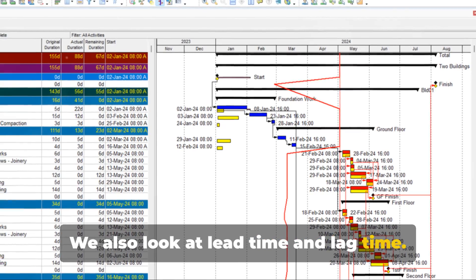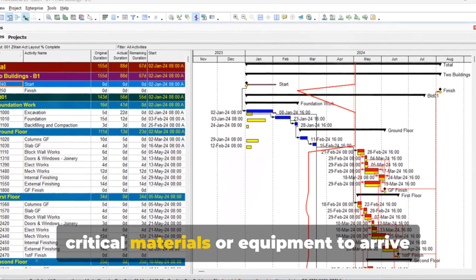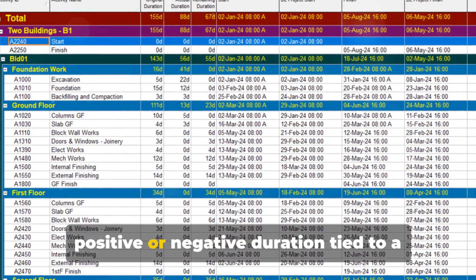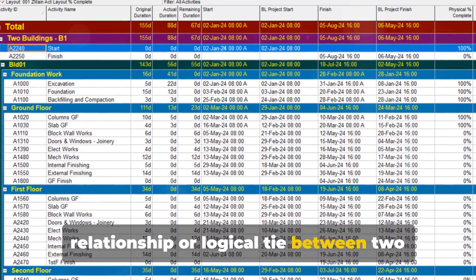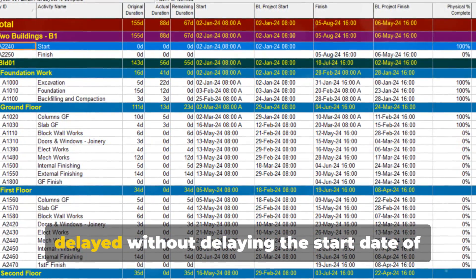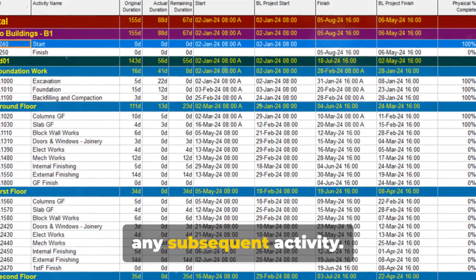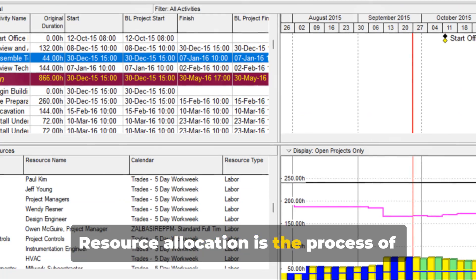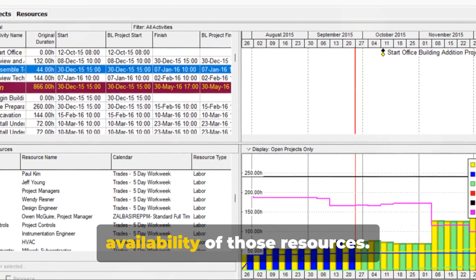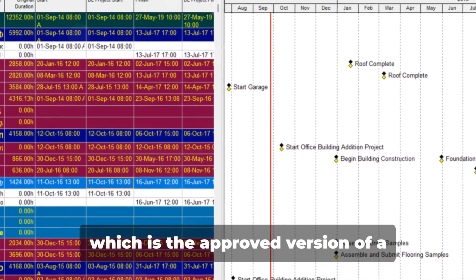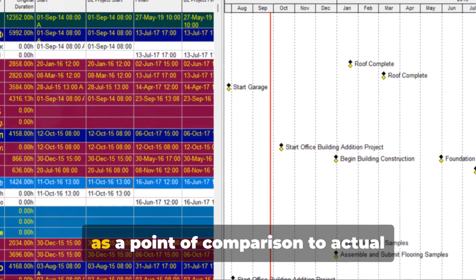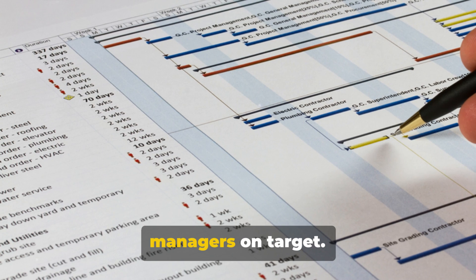We also look at lead time and lag time. Lead time refers to the time it takes for critical materials or equipment to arrive on the project site. Lag time, on the other hand, is the positive or negative duration tied to a relationship or logical tie between two work activities. Float is a calculated value — an amount of time that a scheduled activity can be delayed without delaying the start date of any subsequent activity. Resource allocation is the process of determining the resources needed for a project and the timeline for completing each project task, considering the availability of those resources. Finally, we have the baseline schedule, which is the approved version of a schedule model. This schedule remains constant and serves as a point of comparison to actual results, keeping construction project managers on target.